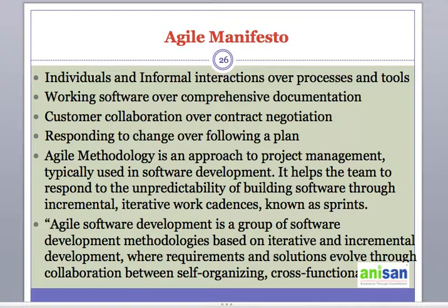You can add at the beginning, you can add in the middle, but depending on the priority of that particular user story or requirement, it will be picked up in the next sprint. That way, all the high-priority requirements are always taken care of at an early stage in Agile.